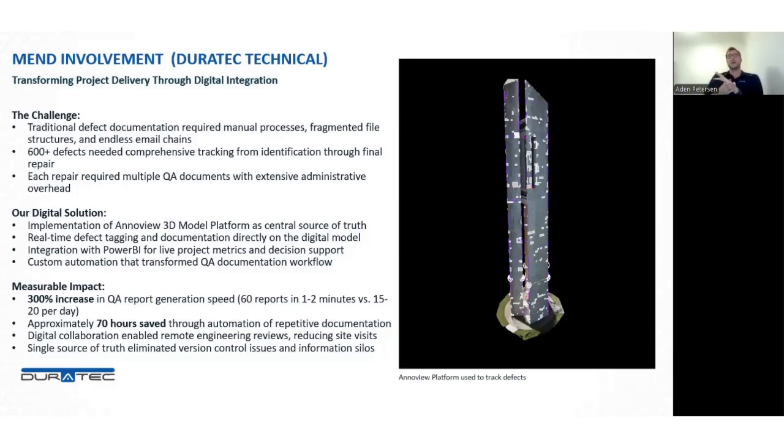Coming onto this project, we faced a massive challenge. We knew there was going to be a lot of defects, and there was about 600 defects that required comprehensive tracking from identification through to final repair and everything in between. And each of these defects needed multiple QA documents and PDFs. Using traditional methods, this would have been an administrative nightmare.